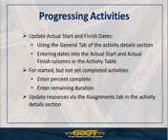If an activity has started but is not yet completed, there are some additional pieces that you need to update for that activity. This is sort of a new concept too. I think for most of you, what you're doing right now in Artemis or in T-Pro is you're just putting start and finish dates on those activities, whereas in Primavera, we're asking you to also put what the percent complete of an activity is, and also the remaining duration, right?